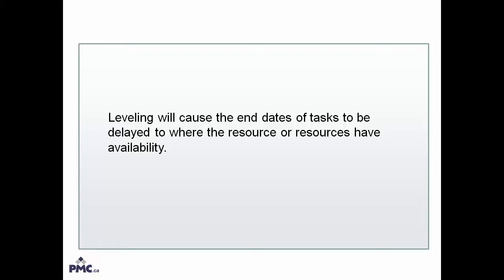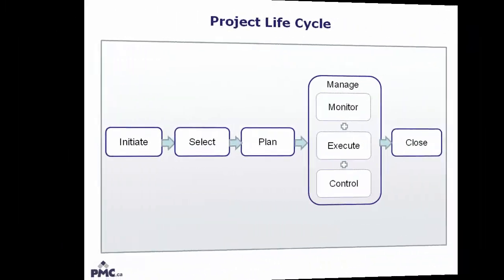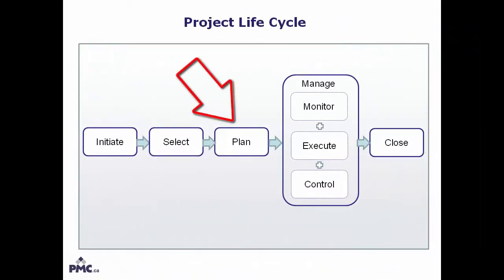So, where does leveling fit in the overall scheme of things? Well, leveling is not a one-time deal. It will typically be performed during the planning phase and during the execution, or shown here as the manage phase within the project's lifecycle. In the planning phase, we probably have limited resources, and so the leveling feature can assist us in determining the delivery dates which are realistic and that we can comfortably commit to.